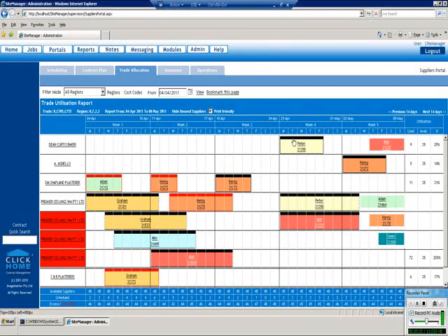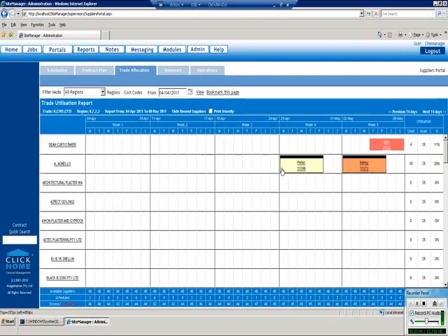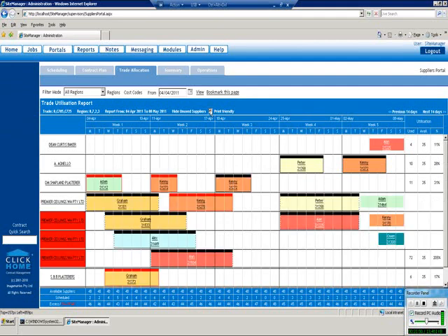The other thing that you are able to do in this screen is to move a task from one supplier to another. So the scenario where you have got someone over-allocated, you're looking to spread the work, so you would move that task from Dean Curtis to Agnello, to allow that work to move around and to ensure that maybe your favourite trade gets the work in preference of other people, or so that a trade isn't over-allocated. So I'm just taking the hide on new supplier just to squash that.